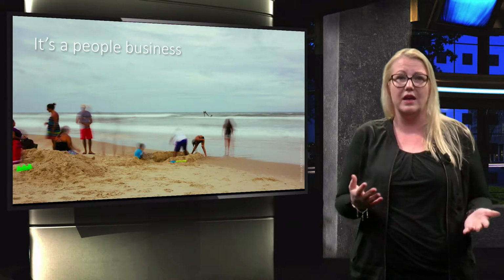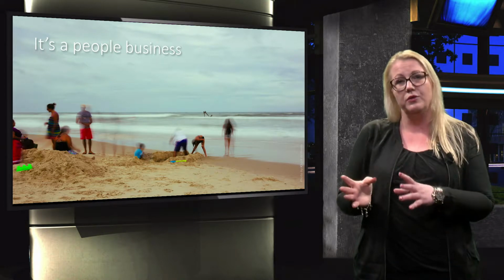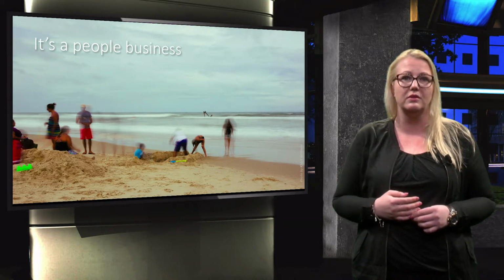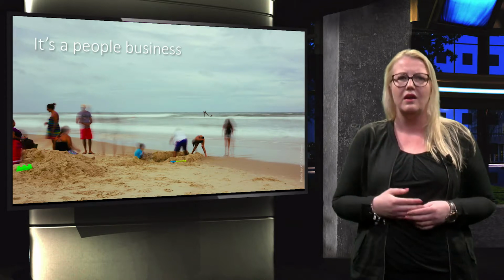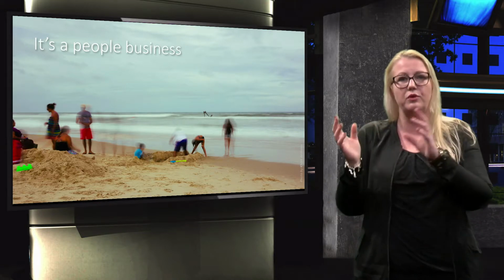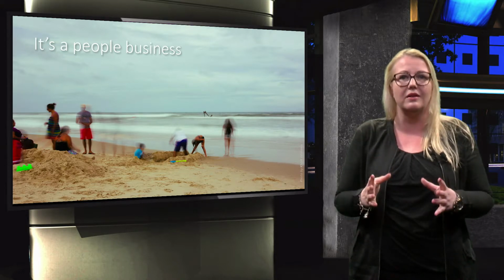What we used to do is have interviews with them. The people in our Amsterdam office had direct interviews with the offshore vendors via Skype and really got to know the people before they started a project. But also in between, give feedback to each other, go visit. Do rotation schedules. Rotation schedules means having people from Amsterdam move to India, Ukraine, or wherever you have your people, so that people meet each other.